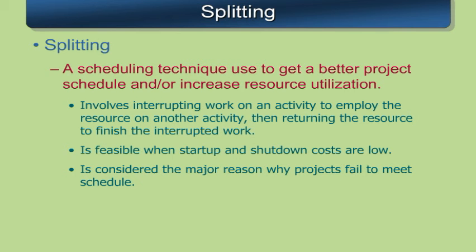Early on, we said we can't split tasks. We can't split tasks when we're doing this analysis. It's difficult to program splitting of tasks into project management software. It's difficult to do in general. We don't recommend it, but the reality is sometimes you need to split tasks. You're needed as a resource on a project, and so you've got to stop what you're doing on this project to go on. And there's an impact.